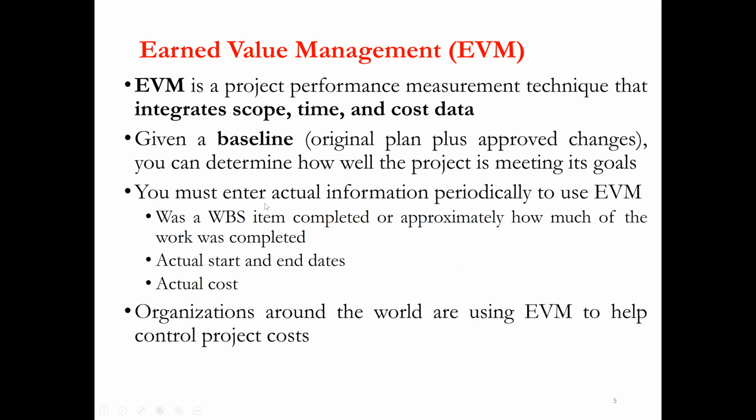Okay, you must enter actual information periodically to use the earned value management method: the WBS, work breakdown structure, items completed, or approximately how much of the work was completed; actual start and end dates; and actual costs. Organizations around the world are using EVM to help control project cost. These days almost every organization is using the earned value management method to control the project cost.